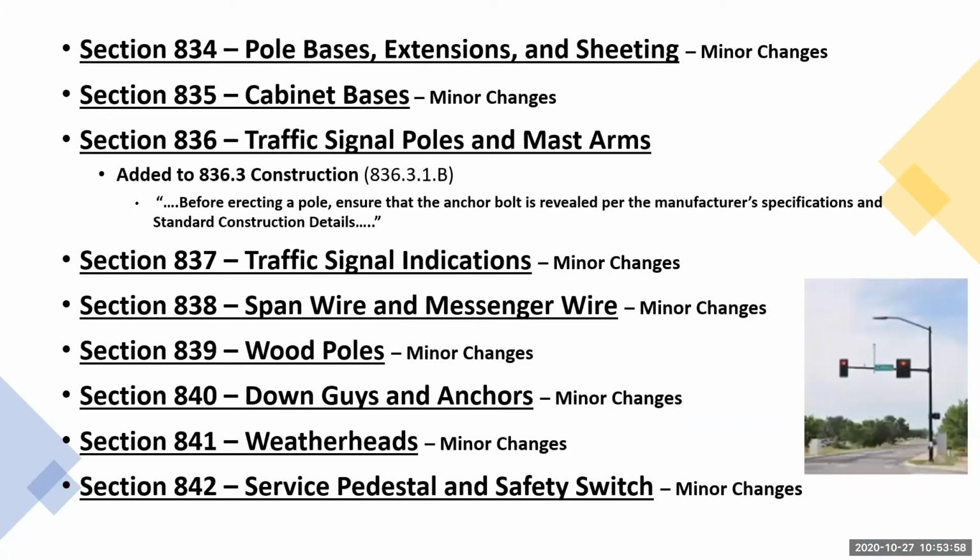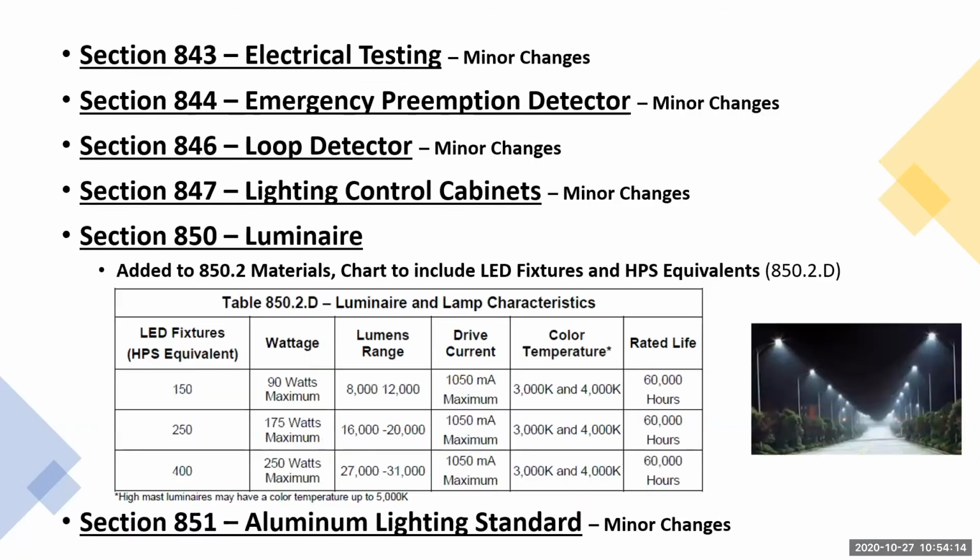For cabinet bases, we added a statement that the removal and replacement of any type of pavement under the cabinet base is incidental to the cabinet base item. So keep that in mind from a construction perspective. Again, minor changes to the remaining sections there.